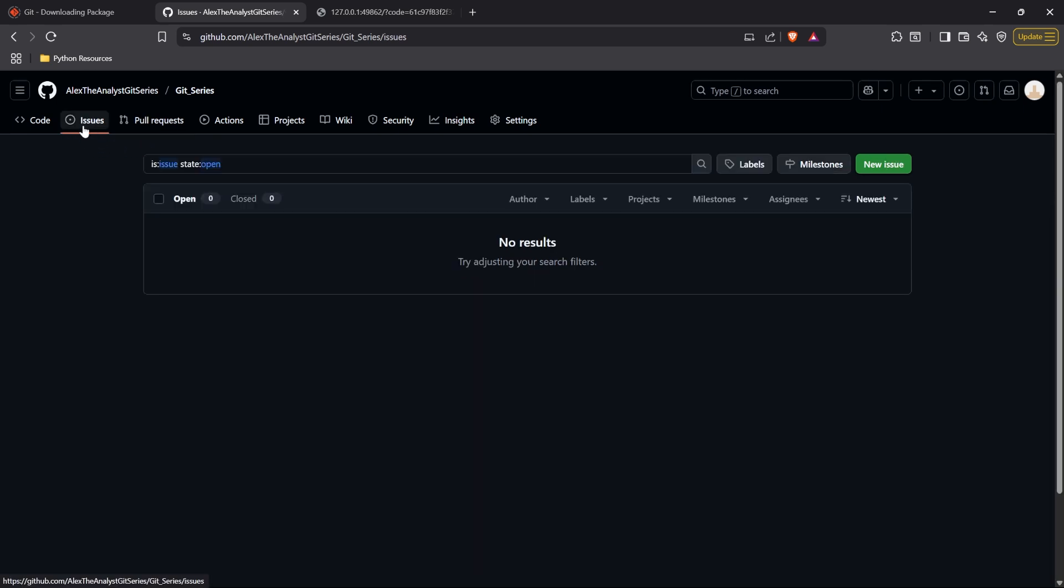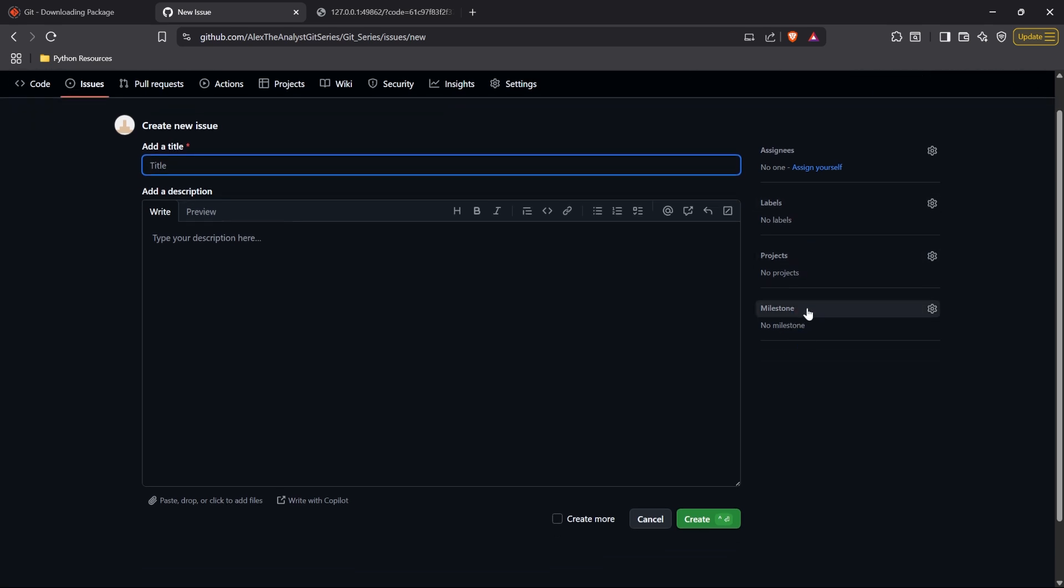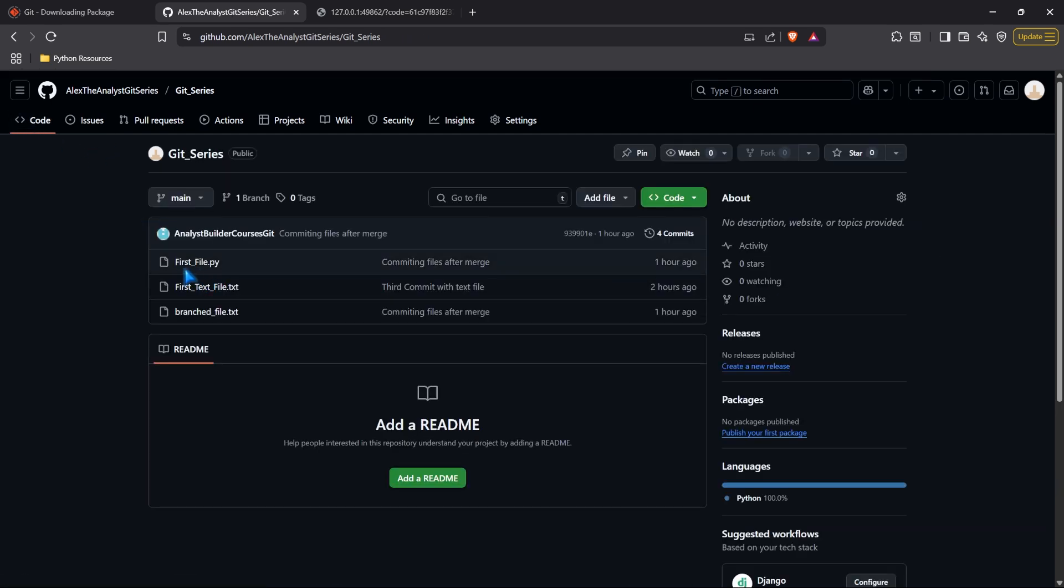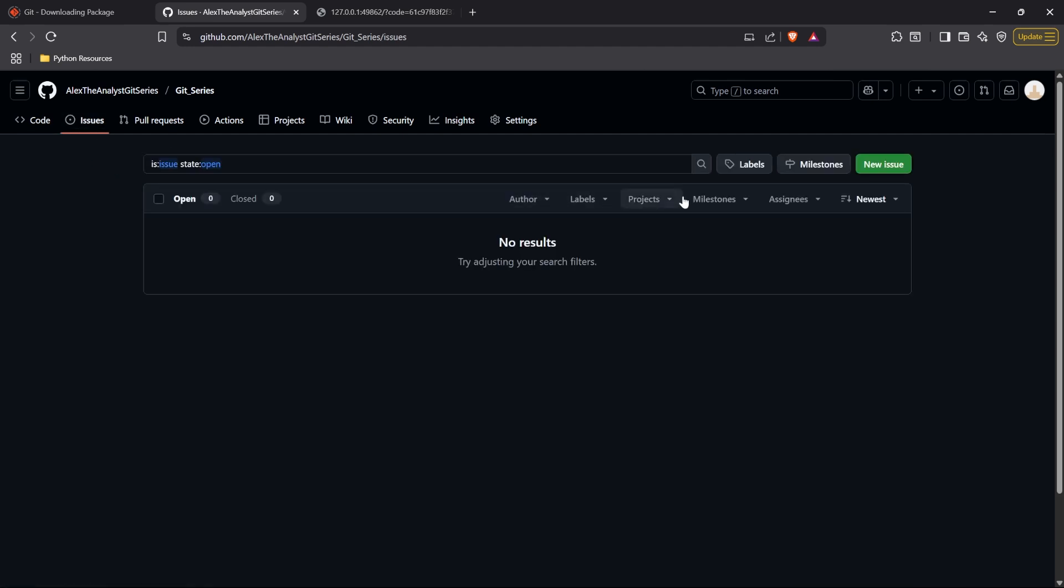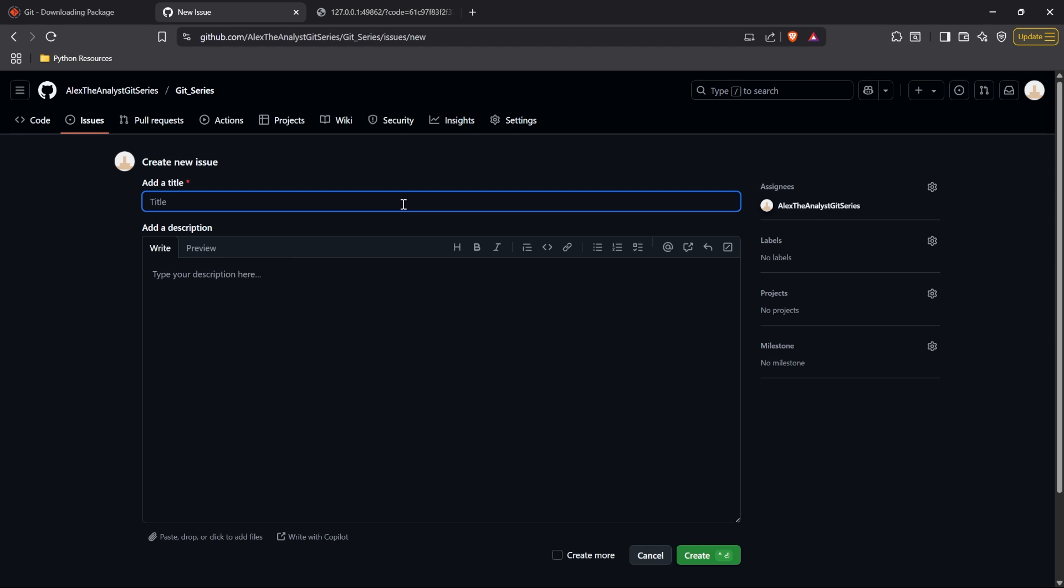There also is issues and issues are really common, especially within larger teams. So if you're working on code, you can create a new issue and you can assign it to somebody. You can label it. You can assign it to a project or whatever milestone you might be working on and you can create it. So if you're going back in the code and you see there's something wrong with this first file in our output on our website or for this customer, they're getting something weird. So we create an issue, we assign it to someone and then it will show up right in here. So let's go ahead and create a new issue really quick. I'm just going to assign it to myself and I'm going to say first file not working correctly. This is a terrible title,